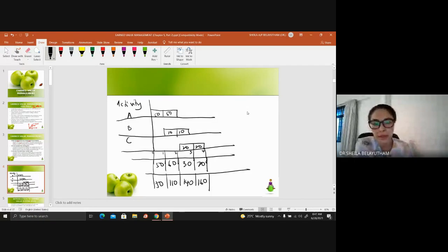But in general, to make things easy, we divide it equally, assuming that we have similar resources throughout the duration of the activity. Okay, and once you have done that, how can we come up with the S-curve? This is where we look into weekly cumulative or daily cumulative. Let's say we're talking about daily. So for day 1, you have 50 ringgit. For day 2, you have 60 ringgit. For day 3, cumulative activity 30 ringgit. And for day 4, 20 ringgit.